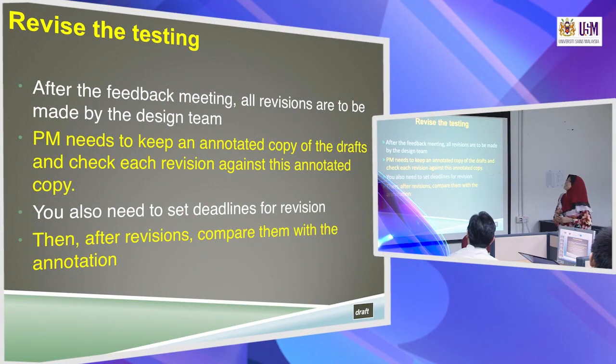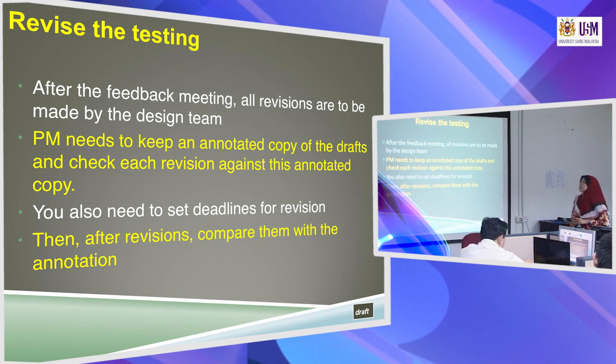After the feedback meeting, all revisions are to be made by the design team. The project manager needs to keep an annotated copy of the drafts and check each revision against the annotated copy. You also need to set deadlines for revision. Then after revisions, compare them with the annotation. So many revisions, so many drafts and so on.